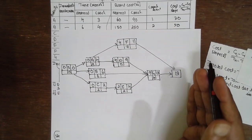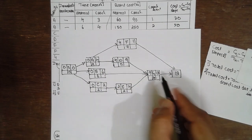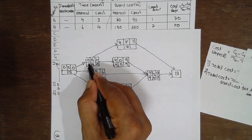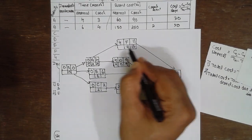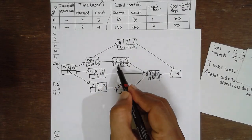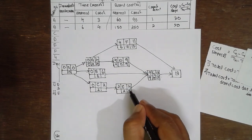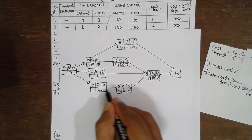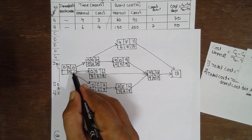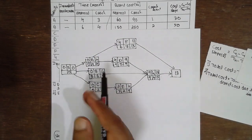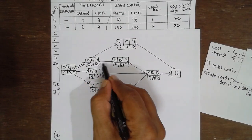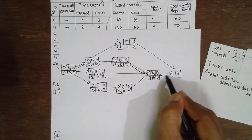For the backward pass, moving right to left: starting with 13. G: 13 minus 4 = 9. D: 9 minus 5 = 4. A: 4 minus 4 = 0. F: 13 minus 7 = 6. At junction, select the smallest: 6 or 4? Choose 4. E: 9 minus 2 = 7; C: 7 minus 2 = 5. B: 9 minus 6 = 3. At the Start junction, smallest is 0. The critical path is A–D–G with values 0, 0, 4, 4, 9, 9, 13, 13.